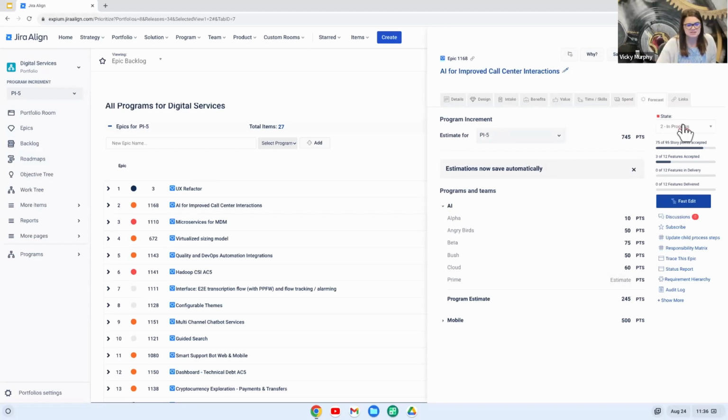In the links tab, you just add some additional links in. On each of these tabs, you've probably seen something that is pretty steady, which is this progress report here. Again, it's all about story points, driving from the team level of stories linked up through features, potentially up through capabilities, up to this top tier epic.